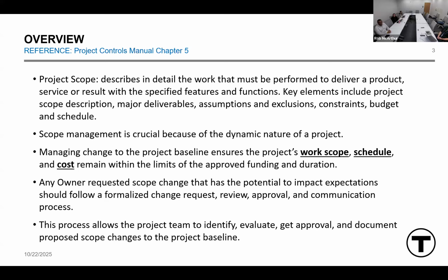we're doing elevators and we are moving along in construction. Stakeholder pops up and says, oh, by the way, this escalator also needs to be redone. Could you add the escalator in the scope? That is a scope change. That is one that we would have to introduce into this process. Okay.